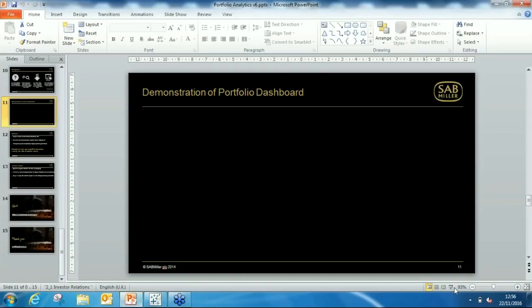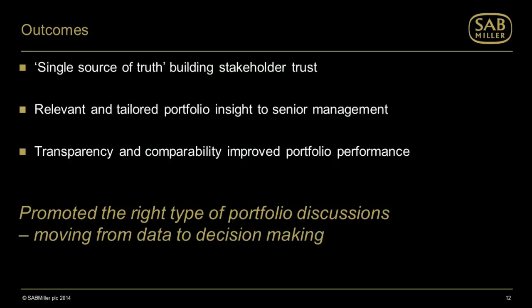I'm just now going to take you through the outcomes. So 3 outcomes here. The first one, we managed to phase out, as you heard from Will, a number of reports that existed within our various regions and provided a new comprehensive reporting function. This was then used by different regions and departments to build on further for their own purposes. We improved the data quality and cleanliness, drastically improving compliance and forecasting information, and we had an approximately 60% reduction in time taken on reporting across our virtual portfolio teams, whilst providing more comprehensive and accurate information.